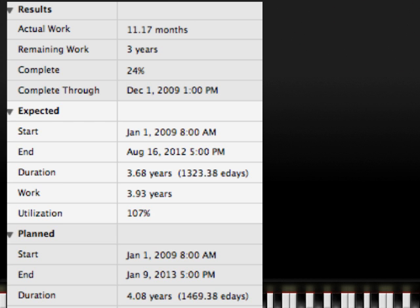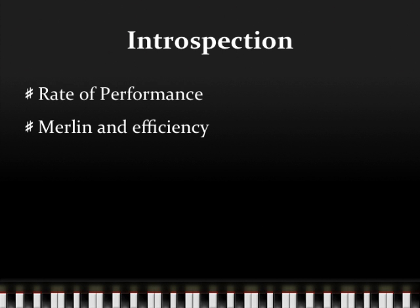Rate of performance is useful and necessary. Managers must always know where projects are on a timeline. If projects are moving too slowly, they must be able to tell their superiors the estimated delay as soon as possible. The rate of performance is about the same as the inverse of the percent of project completed. I found that Merlin can calculate the percent of project completed for me. Therefore, in the second example, I did not have to calculate rate of performance myself.